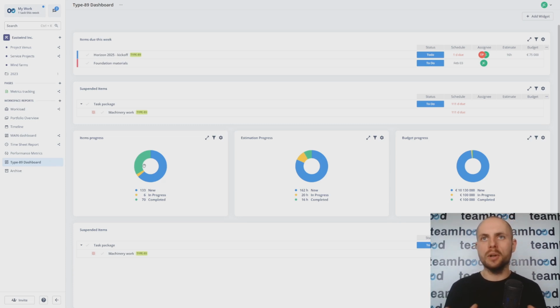invoicing to the customers. So imagine you create a tag which is called billable, and then you just tag items which are billable. This way, in your dashboards, you will always be able to select it as a filter and save it and see only what billable work has been done. Very useful, right? And tags are superior to row structuring or user assignment in one way, because you can have more than one tag assigned to a single item. This is a very important difference. And it means that you can slice information from multiple angles for the same item.